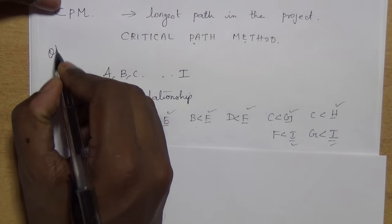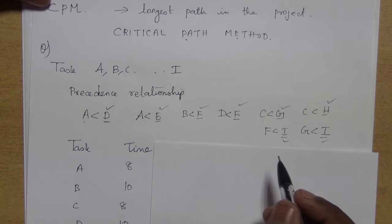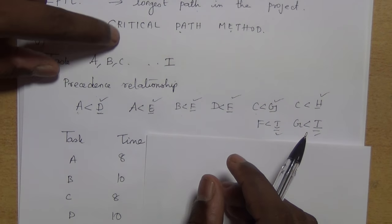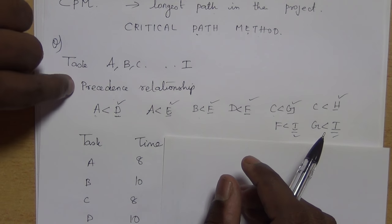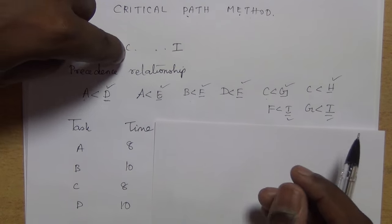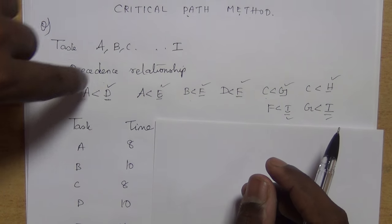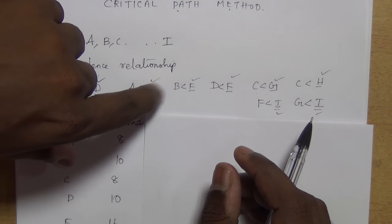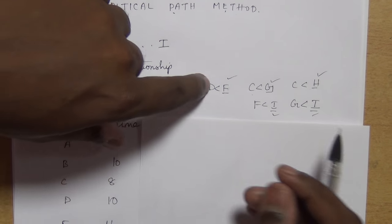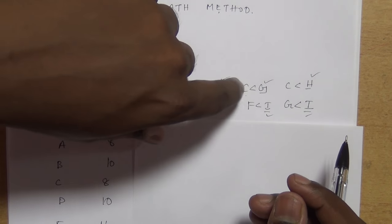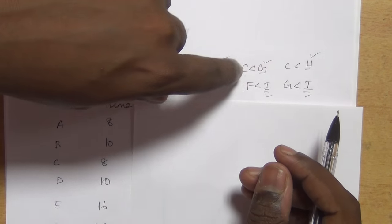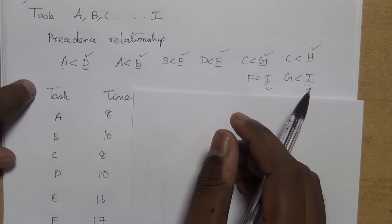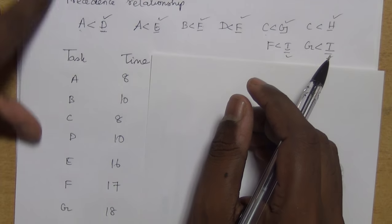So there is a problem. Assume we have tasks A, B, C up to I and the precedence relationship between these tasks is given by: A less than D, A less than E, B less than F, D less than E, C less than H, F less than I, G less than I. And the task and the duration is given in this data.